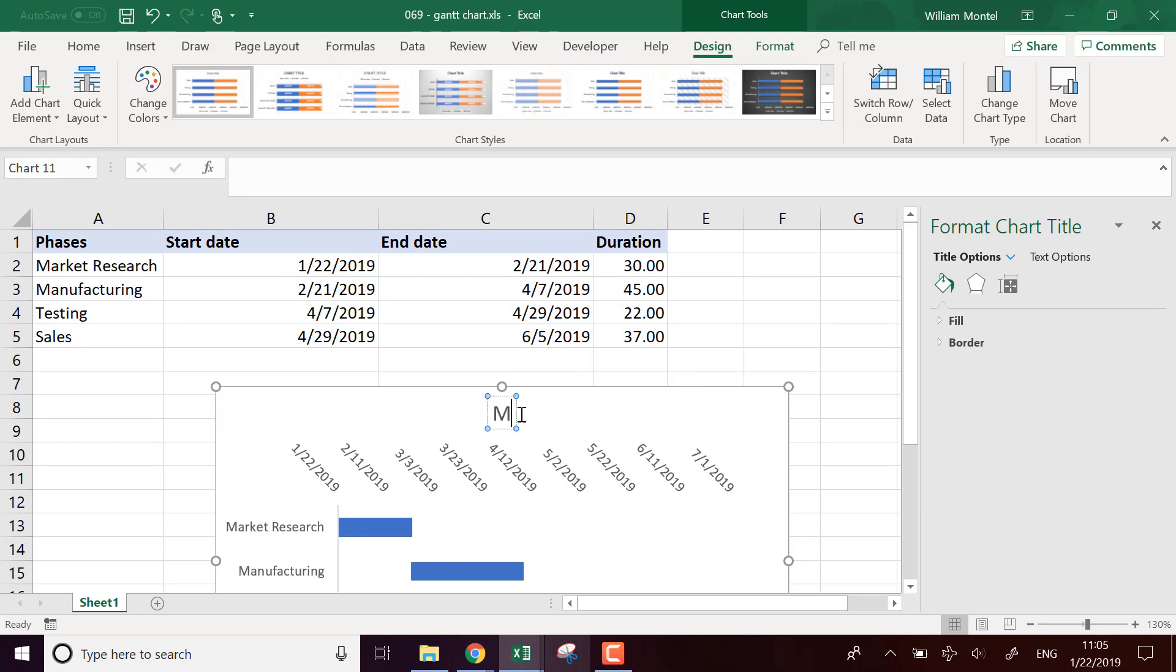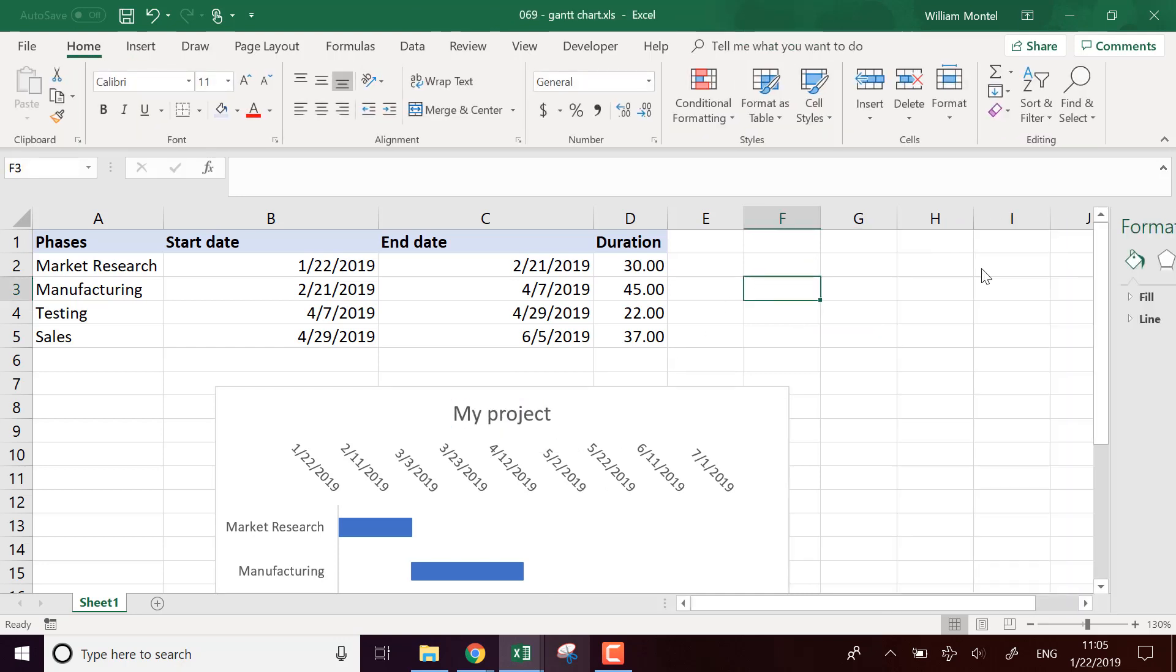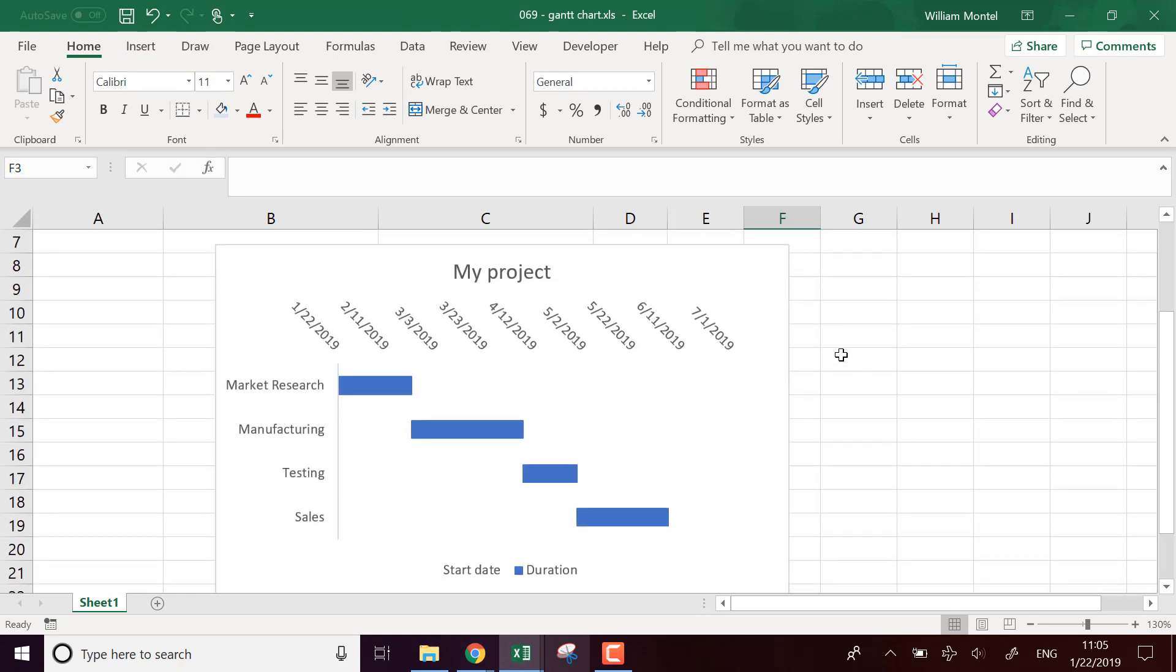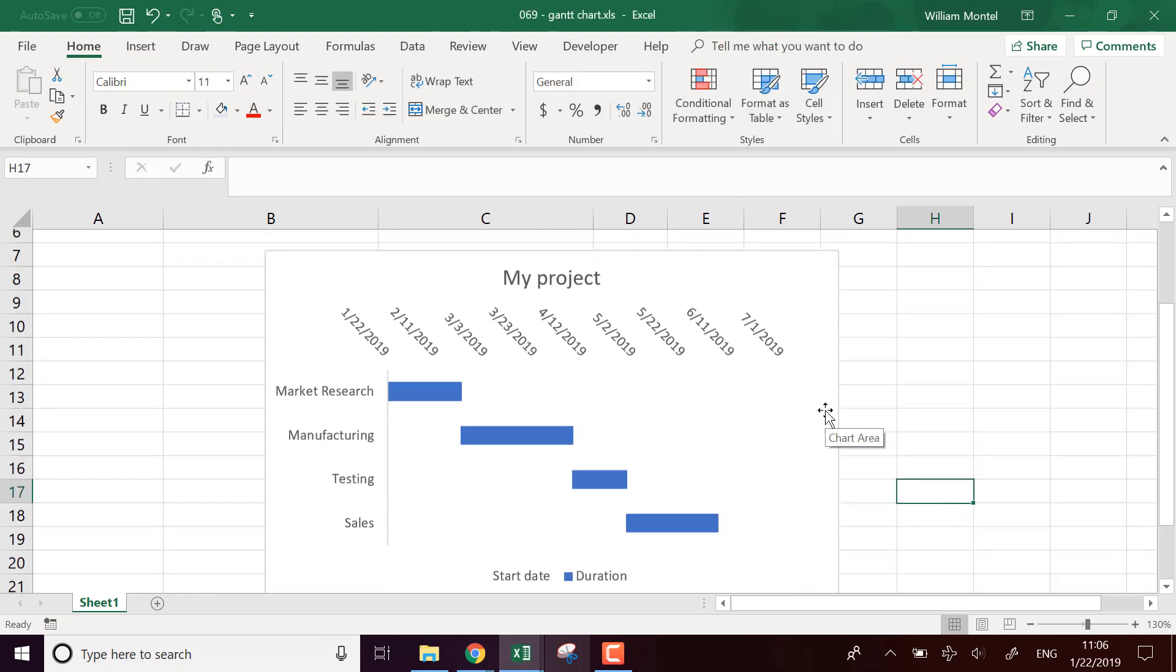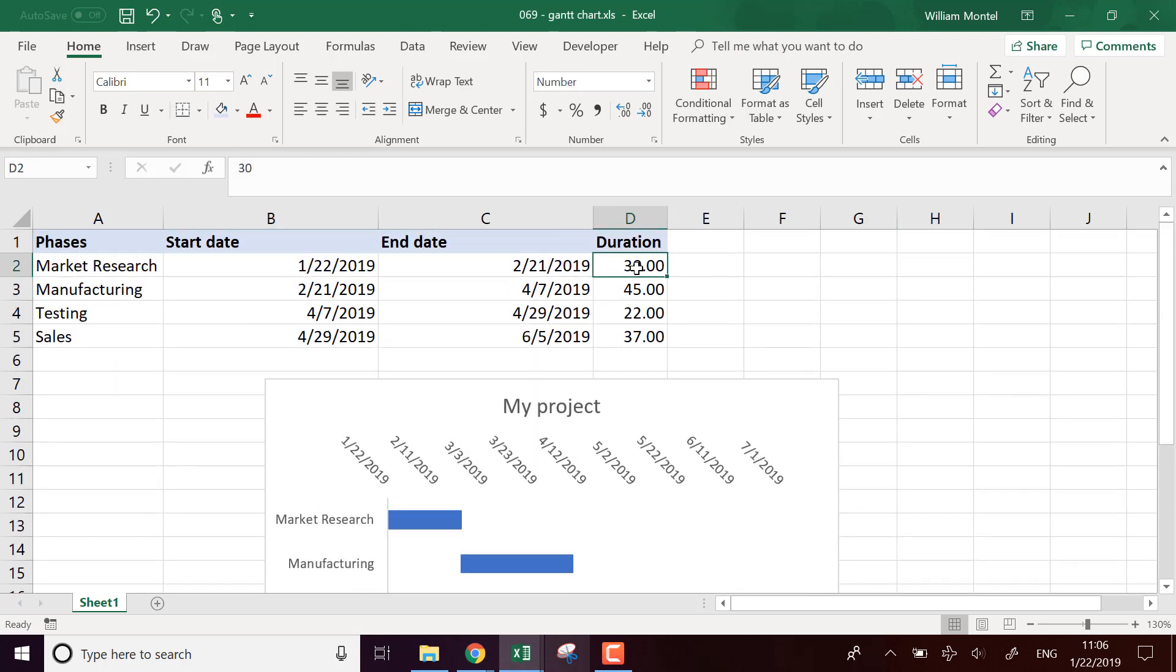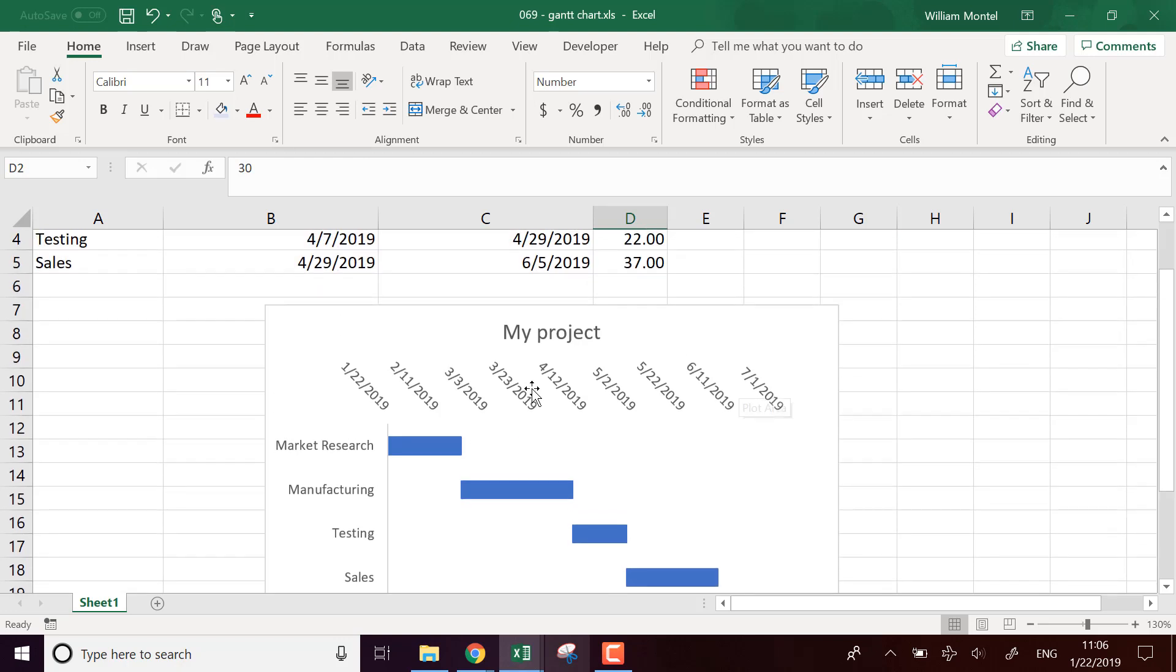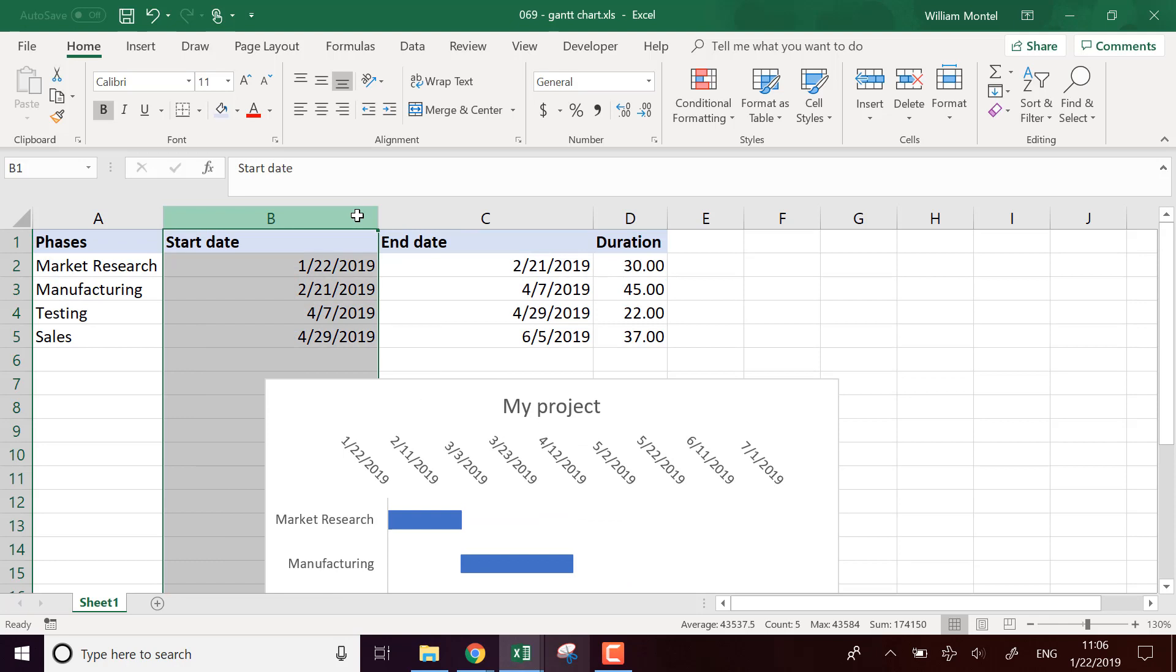And so here, I'm going to say my project and here we have our Gantt chart. So to wrap this up, how do you build a Gantt chart? You have to put the start date and the duration. You stack them into a horizontal graph and you make it start at the start date.